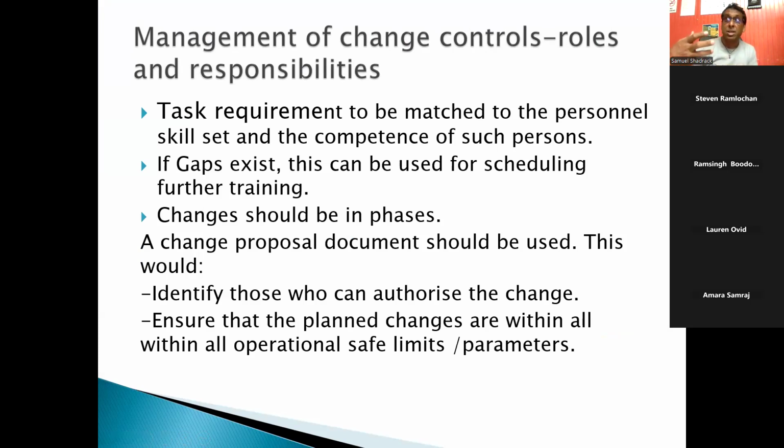Yeah, if you're making a change, you've got to make sure that what you're doing is not upsetting another parameter. Like how Stephen mentioned noise. If you're increasing the RPMs, well, what's the noise level? Like what the law says about noise, 80 decibels. So how does that affect that? Right? So that's the implications of the change. If you want to remember any other word, implication of your change, I've called about five.